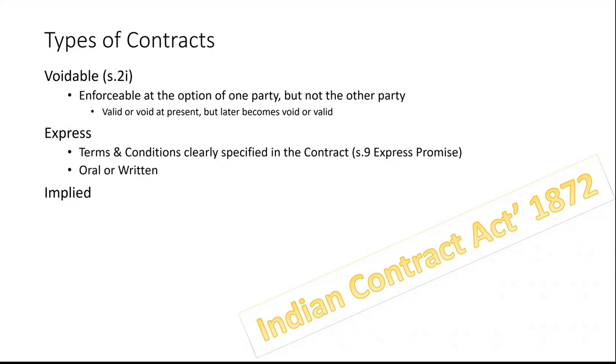The thing that comes in here is reasonability. If you think that the thing is implied, it should be under that purview. Like the example I have given, that for the wall you should supply the material and do the design. Now you ask the party to also install a tube well alongside that wall. Now you say because you have to make the wall, you have to make it alongside the wall. No, it's altogether a different thing, right? You cannot say it is implied that you make it. So the question is reasonability. Whatever is considered a general practice to be covered in that package is implied. Whatever is not written is not written.